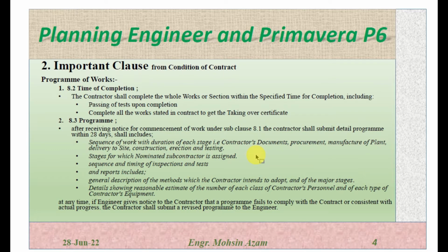The project will start from the engineering part. So all this contract document is actually the engineering part, which is to submit all the shop drawings, method and material submittals. Then the contractor will proceed to the procurement of the items, and then the manufacturing. At the time of manufacture, after procurement, they have to set up their precast yards, and when the items for which we placed the order will be delivered to site, when the construction will be completed, and when the testing will be done.